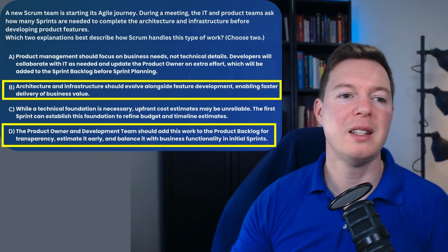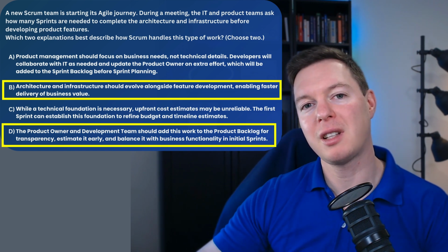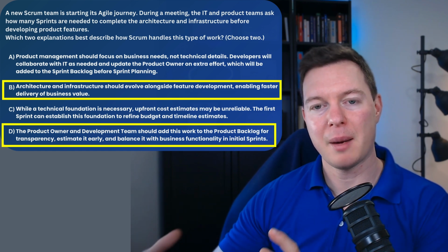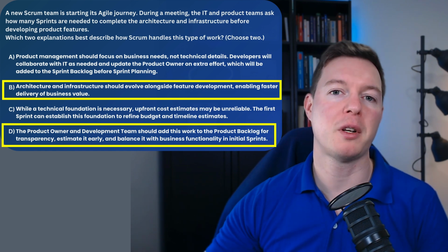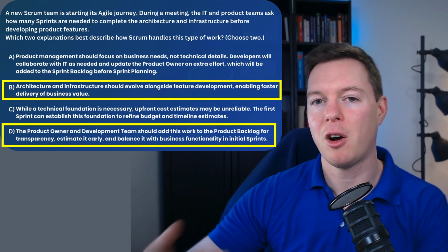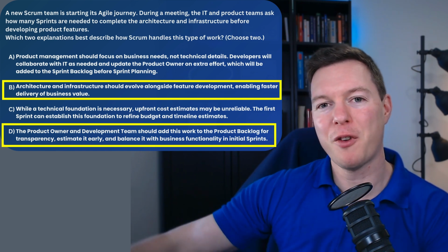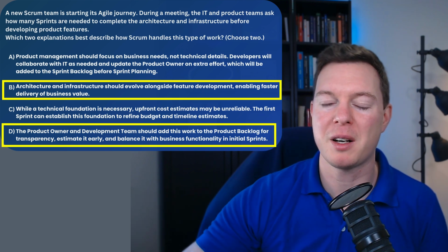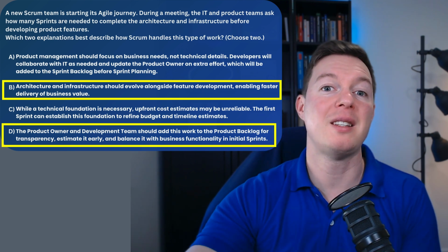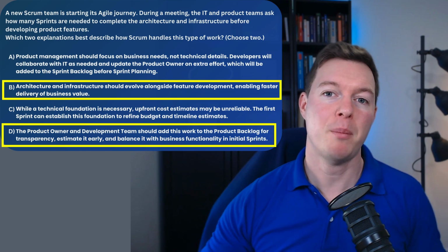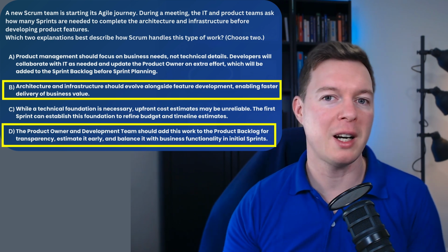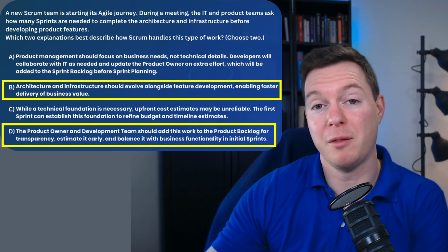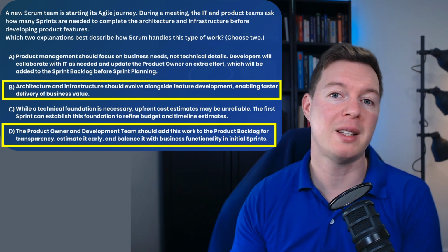It works better in the complicated domain, such as if you are a house builder, one of these companies that builds properties, and they take a plot of land and build the same houses on it, and then they move on to another plot of land and build the same houses from the same blueprints and the same architecture. That is the complicated domain. Because they've done it before, they've got a good idea of how long tasks take and what's involved, and that means that they can plan quite accurately.